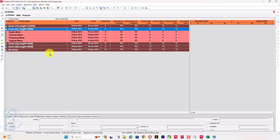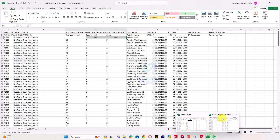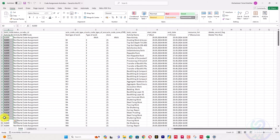This video demonstrated how to get project or activity codes from another Excel sheet and import them into your project. Please make sure that when updating activity codes from another Excel sheet, you first export the schedule to Excel, then use VLOOKUP from the reference sheet to the exported sheet, and then import back. Also ensure that the Activity ID matches between the two Excel sheets.